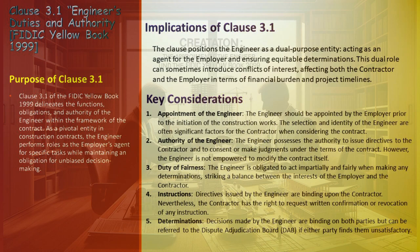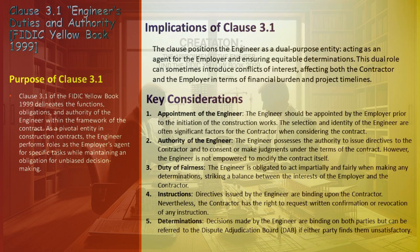Key considerations under Clause 3.1 include: the Appointment of the Engineer, where the employer's selection of the engineer is a critical early step significantly influencing the contractor's approach to the contract. The engineer holds authority to issue directives and make judgments within the contract's scope, but altering the contract itself is beyond their authority. Maintaining impartiality is a cornerstone of the engineer's role, balancing the interests of both the employer and the contractor. The engineer's directives are mandatory for the contractor, though provision exists for the contractor to seek written clarification or revocation of instructions. Decisions made by the engineer are binding but can be contested through the Dispute Adjudication Board (DAB) by either party.